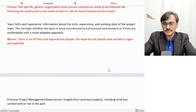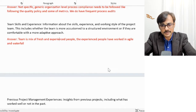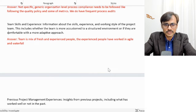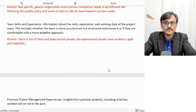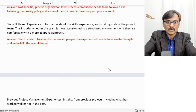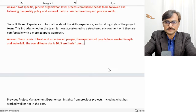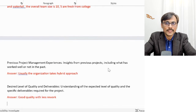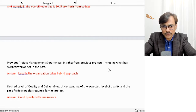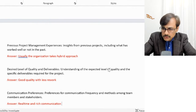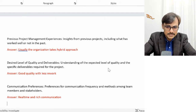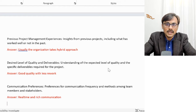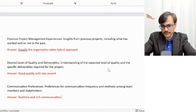For team skills and experience, the team is a mix of fresh and experienced people. The experienced ones have worked in both agile and waterfall. The overall team size is 10 — five are fresh from college and the other five are experienced. For previous project management experience, the organization usually takes a hybrid approach — that's the organizational style. For desired quality level: good quality with less rework is the goal, and rich communication is needed.